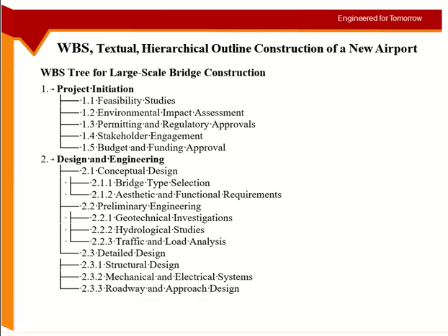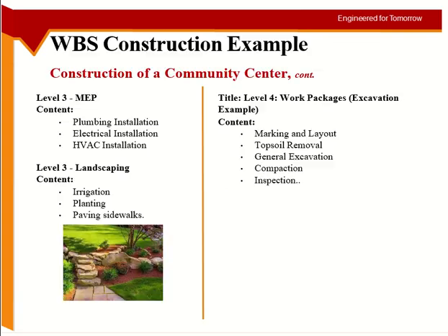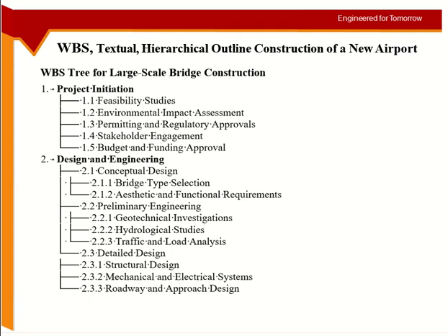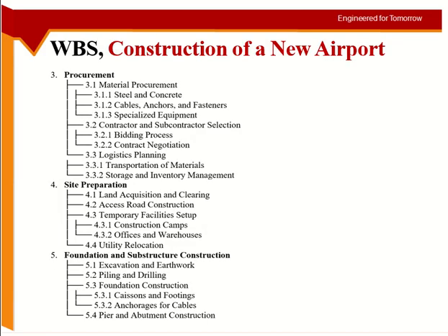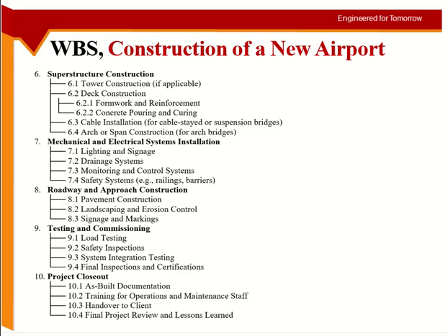Okay, and I discussed maybe one of these examples, and I said you can have a look at the other one. I believe the main thing was that one is for a smaller project, this one was for a bigger project. So you can see tasks like project initiation and procurement, project closeout, commissioning, testing, because the project is big, so even these things will take a lot of time and effort.